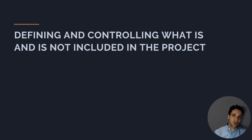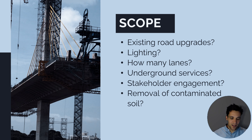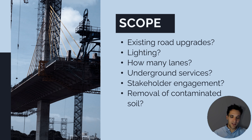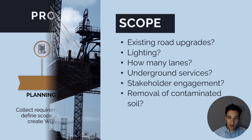Project scope management is defining and controlling what is and is not included in the project. If we take for example a project to build a new bridge, defining scope is understanding and clearly articulating whether we're upgrading existing roads, whether we're doing lighting, how many lanes we're providing, whether we have to relocate underground services, who's responsible for engaging with stakeholders, and if there's contaminated soil who's responsible for removing it. The way we go about answering these questions is really scope management.